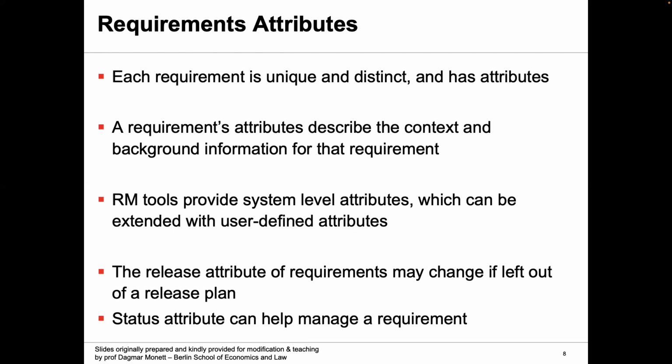Here is an example that I'm going to quote from the book again. A product manager of a company wanted to track which requirements the team included simply because a competitor's product had the same capability. A very good way to track your requirement would be incorporating the attribute of the rationale. A good way would be to write a rationale attribute indicating why a specific requirement was included in the product.